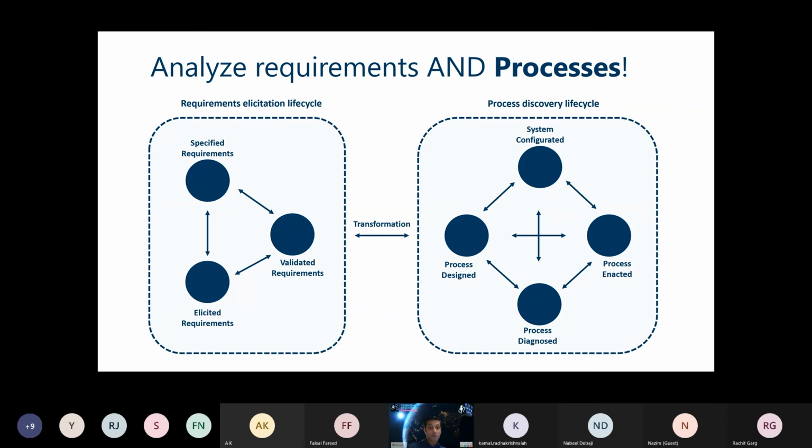Usually there are fewer or very specific end goals of a particular process. You need to identify those. And most importantly, how those processes map with each and every requirement that you come across. If it's not mapped to a particular process, it may not be a requirement really. And you may want to question whether it's really a valid requirement.